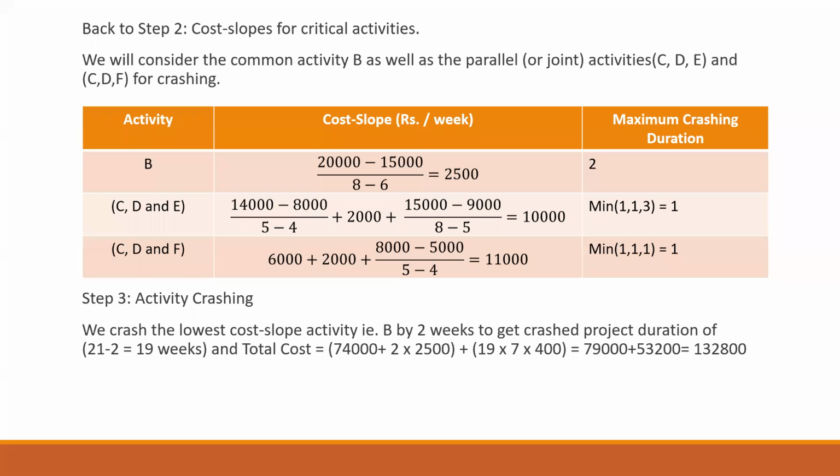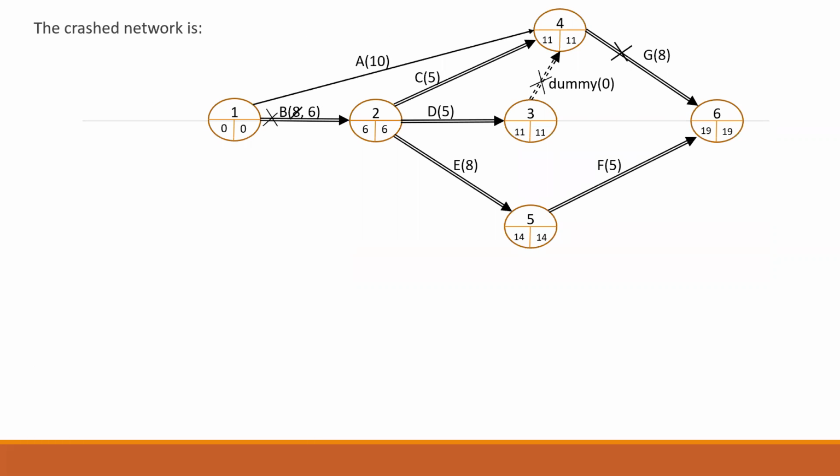Once this is done, we still have to crush the parallel activities, and as both are 1 week, we can go ahead and crush CDE first and then CDF later on. So let us see the calculation for the next step and the crush diagram. This is my new diagram, and the duration is coming as 19 now.